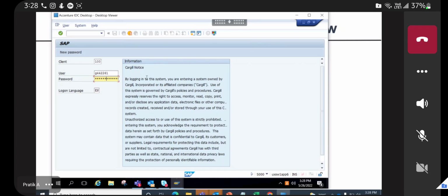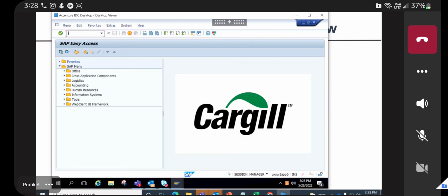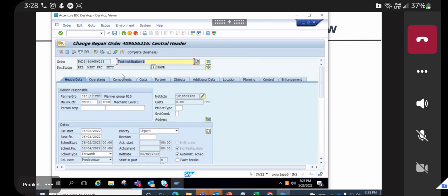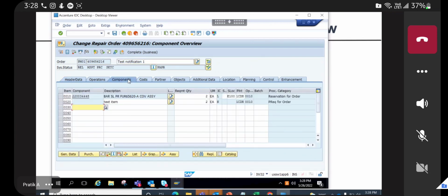But in real time, if a maintenance team goes in and diagnoses the issue, and finds the issue requires more spare parts or more service-related things, then we can update the planning anytime. Yes, we can update it here, but in reality, what happens? I can directly do a goods issue against this order, even if the components are not planned here.